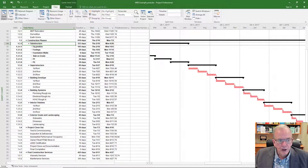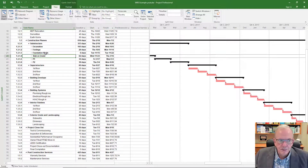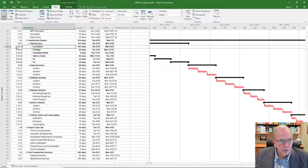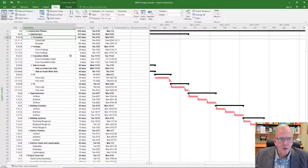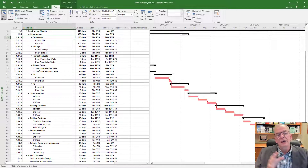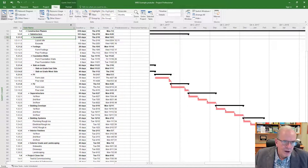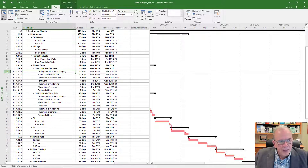Under substructure I've gone a bit deeper. I've created headings for underground parking, slab on grade, foundation walls, footings, and excavation — that's level four. Opening that up goes to level five, which is where a lot of projects stop. Because we have a large slab on grade tackled in two sections, it made sense to break it into slab on grade east side and slab on grade west side. So there's one more level under that, and then at the lowest level are the actual tasks or activities.